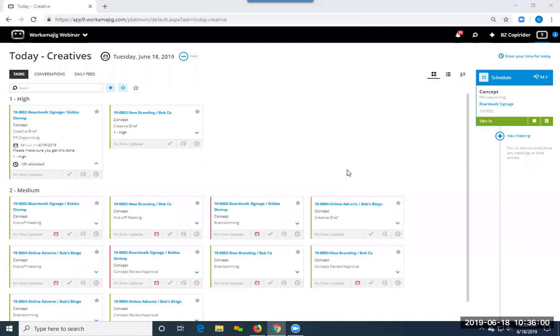So there is this way of bucketing hours. Not many people are using it. Each week is bucketed out for X number of hours, and I can say, I don't need him to work on this 2-week task in the first week, and you can move the hours into the second week. At that point, we'd see it as you doing it manually.